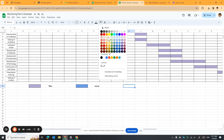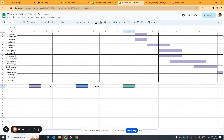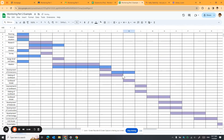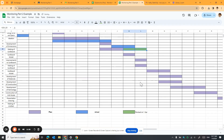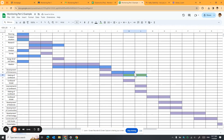Use another color for the revised plan. Click here and use a different color for 'revised' starting 1st of April. By right, I should have done the making of the cover model in the two weeks from 11th March to 25th March. Since I haven't started yet, I need to revise it — I should finish my dimensions by 1st of April and finish making my cardboard by next week, extending it for another two weeks.